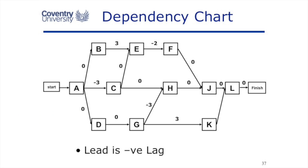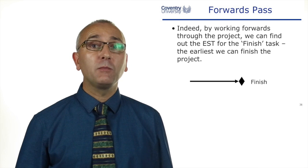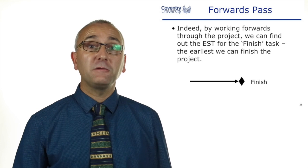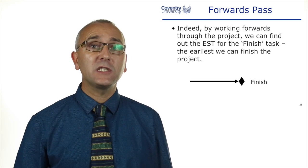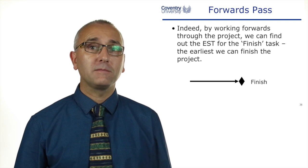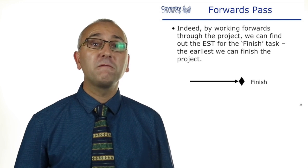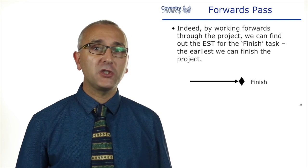Looking at the dependency charts, we can calculate the earliest start time for each task based on the duration. We'd start with task A, we'd work our way through, we'd consider the lead and lag, and we'd work all our way to the finish task. We can find out the earliest possible starting time for the end of the project, for the finished task. That would represent the soonest we can finish the project. And that's what a forwards pass or a forward schedule is.